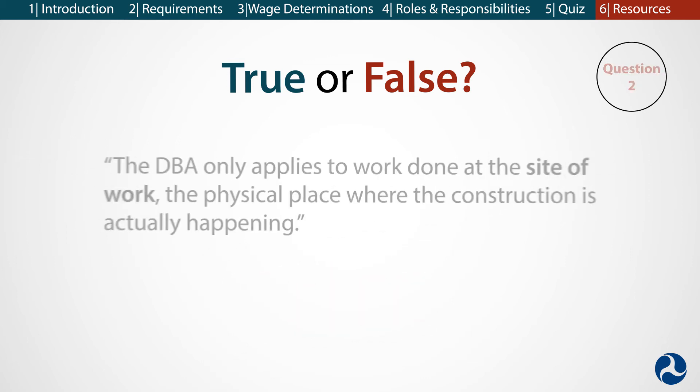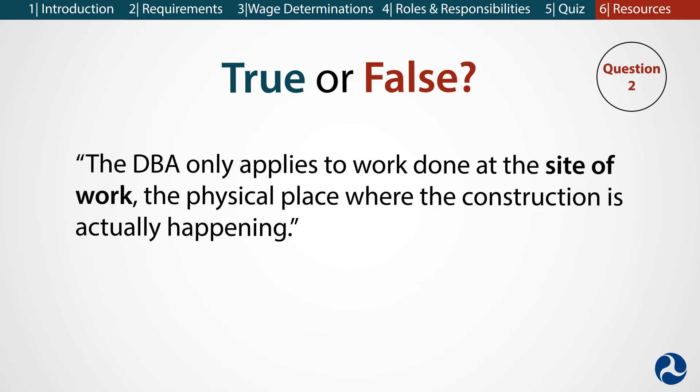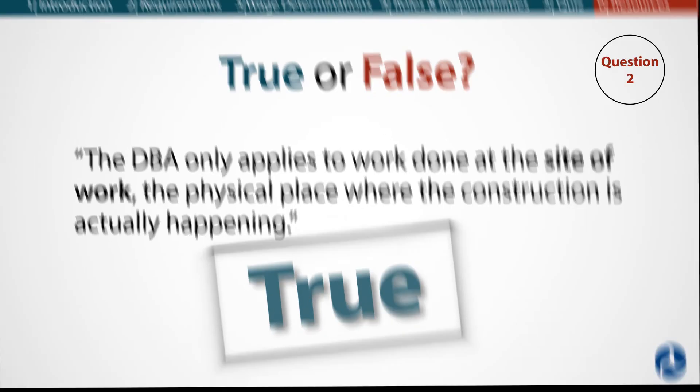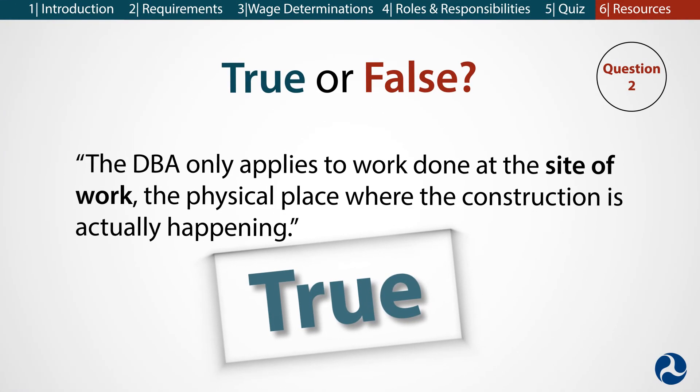Question 2. True or false? The DBA only applies to work done at the site of work, the physical place where the construction is actually happening. True. Work done in a location off of the work site does not fall under the regulations of the DBA.